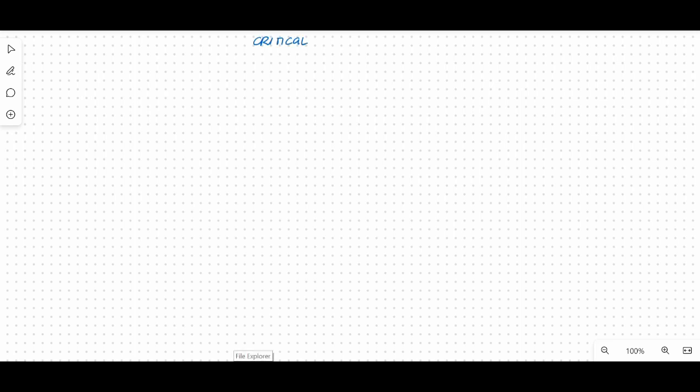Hola clase. Today we are going to see how to make a critical path analysis. And remember that the critical path is going to be made of the tasks that don't have any margin on them. If any delay happens on them, the whole project will suffer. And instead of calling them margin, we call them float, but it's exactly the same.